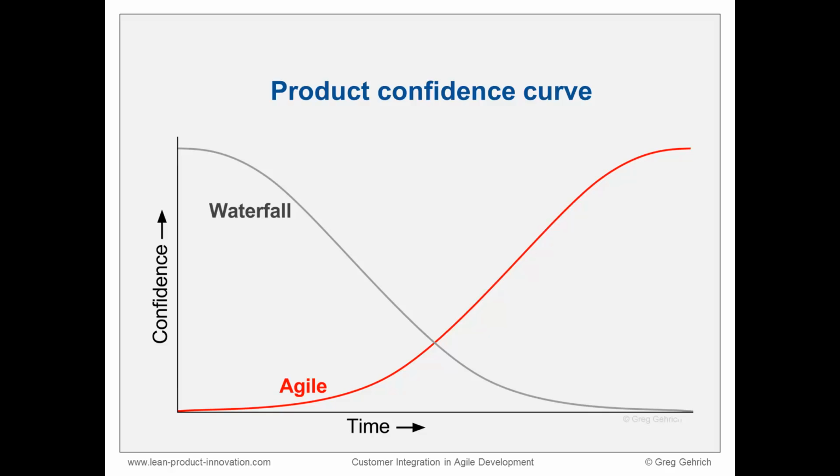So this is similar to the waterfall development, where you track development progress by checking off tasks in the project plan. This is not accurate because it measures work completed, not product value. Like the example of financial claims and patient health, it's a false connection that leads to overconfidence. Over time, this confidence in the project plan erodes as customers begin to use the product, voice their issues, and ask for changes.